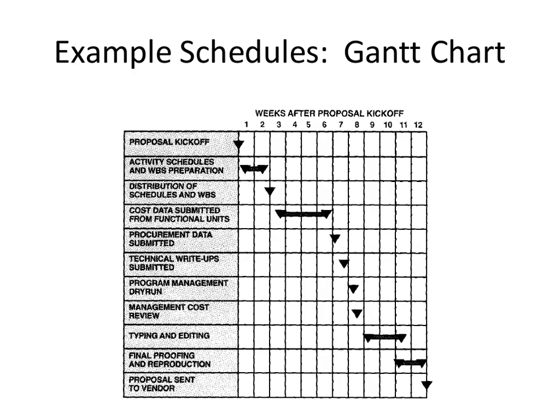Now, the most classic form of schedule is this. It's called the Gantt chart. How many people have seen this before? Gantt charts. Okay. If you go to project management offices worldwide, again, regardless of industry, when I come and visit some of you folks in your internships next year, there's a pretty good chance that I'll see this on the wall of some manager's office. What does it represent? The tasks, the order, when they're starting, when they're finishing. Great. Tasks, their order, when they're starting and when they're finishing.